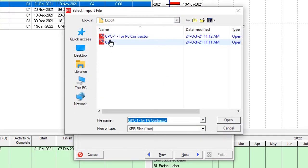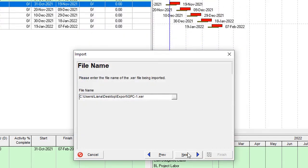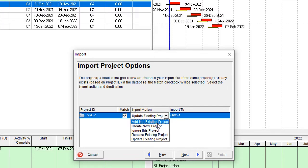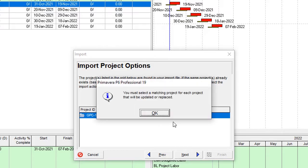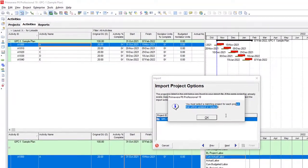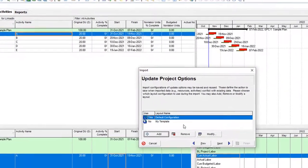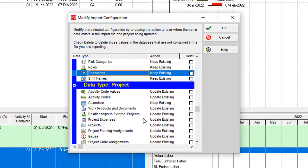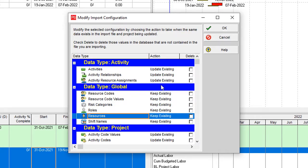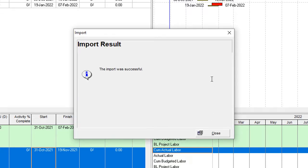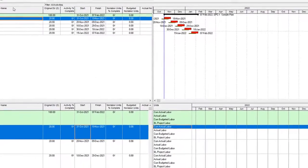I have two options for import. If I import this project I can update it, replace it, ignore it, create a new one, or add into an existing project. I'll choose to update it, so I need to select the matching project. I should open this item and select this project, because more than one project may already be open. Then you need to modify and select what kind of data you need to keep and what kind of data you need to update. Then finish and wait for the software result. The import was successful.